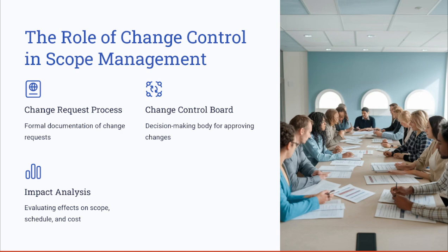You also have the change request process, which is a formal documentation of the change request. That change request has to highlight all of the impact, the level of changes in terms of the budget, in terms of the timeline, and in terms of added risks. So this is what the change request should contain. Also, the authority for approving these changes.